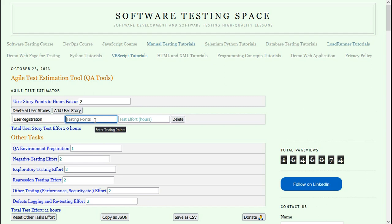Your team should have already estimated the user stories using Agile estimation techniques. Those user story points are for the complete user story development, testing, and deployment. So out of that, how much are the testing points?